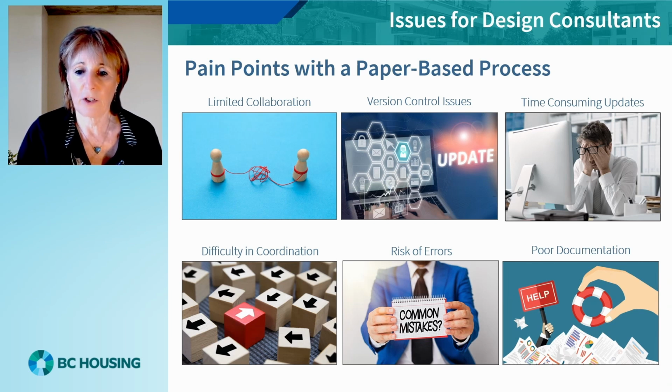It is a common occurrence for an RFI to question which drawing view they should be following: plan, section, elevation, or schedule. Representing a 3D facility only through 2D documentation is problematic, especially with complex geometry. Does the 2D drawing correctly represent the 3D reality? The manual process of managing and updating all the separate drawing views to ensure that changes made to one have been captured in all leads to poor documentation, inaccurate costing, and increased change orders.